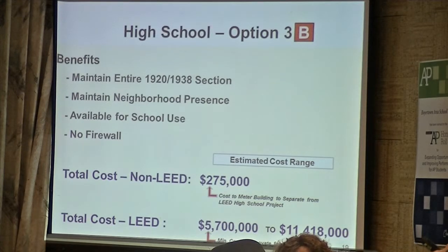So what month are you saying you should know by, to be more beneficial financially, to put it into the project? Probably by June, I would say. So by June of 2013, not 14. If you want to put it in the bids that are going out for this project, then you need to know by June.